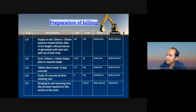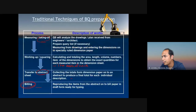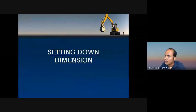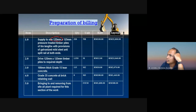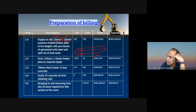This is an example of a BQ. The example shows: supply to site 125 by 125 treated timber pile of length 6 meters with provision of galvanized mild steel anti-split ring at both ends. The timber pile size is 125 x 125, 6 meters in length per piece. The quantity is 322. The rate and the unit are in numbers. This is an example of BQ.